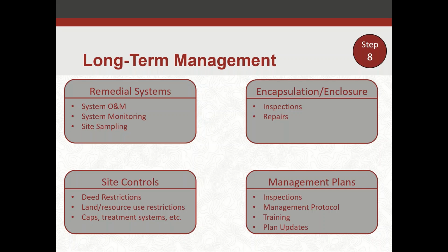Or you might have a cap or treatment system, how you deal with managing a site cap or a site treatment system. And then management plans, inspections, management protocol, training, plan updates. So this might be something you implement for on-site employees or maintenance personnel, so they know how to maintain a property and avoid any sort of disturbance of contaminants that are going to continue to be on site.